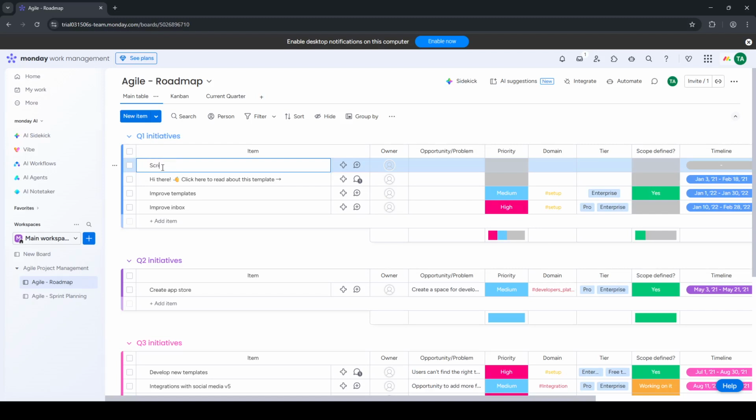If you have a lot of related work, consider a consistent naming convention, such as a prefix for the sprint number or feature area. This makes filtering and reporting more reliable later. With the task created, let's edit its key details, specifically the due date and the status.